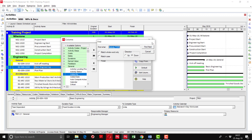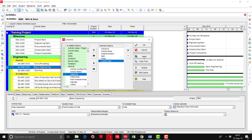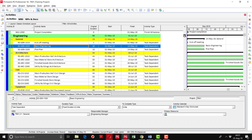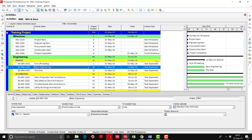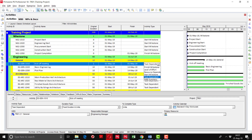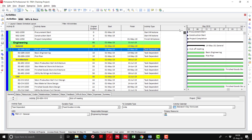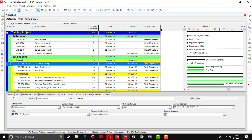Double-click to move the Activity Type field to the right side, then adjust its position. Double-clicking the field in the column will expand it and display a dropdown list where you can change the activity type directly. All our activities are currently Task Dependent and we are not changing them, but the purpose of adding this column is to demonstrate how to change the activity type directly from the column view as well.